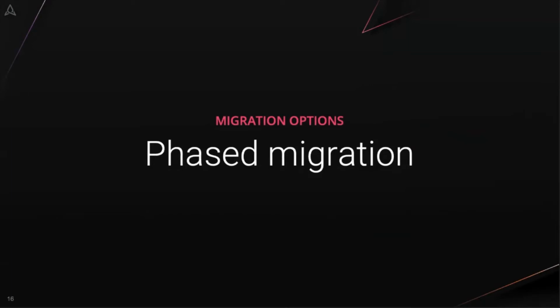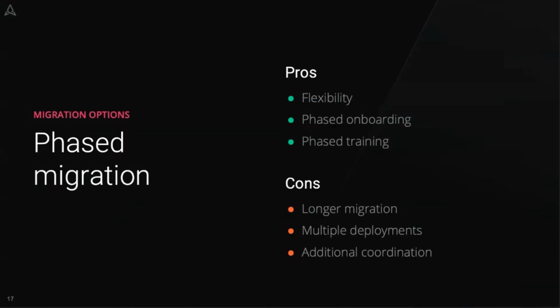All right, so now that we've talked a little bit about the scope of your migration, we'll talk a little bit about the process and how you can actually migrate in phases, if that makes sense for your organization. So phased migration might be for you if, for example, not all the departments at your company are ready to migrate at one time. Maybe you have groups that are in the middle of a time-sensitive project, or key stakeholders are away and not available till next quarter, something like that.